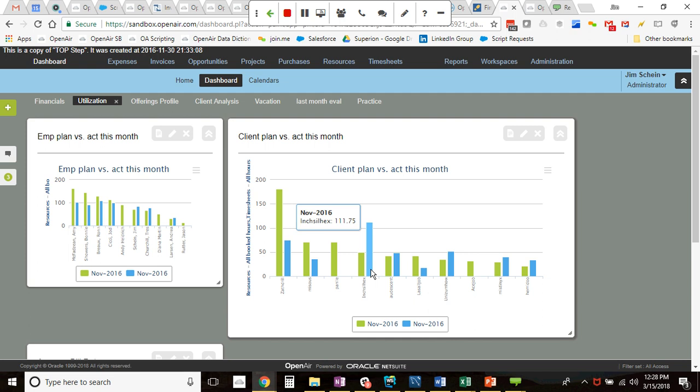I'm going to advise against it, and I'm going to advise against it rather strongly. The reason is that you then remove any ability to determine how you are doing against your forecasting. Because you've removed your booking numbers, you've removed your forecast essentially, and you can no longer see that we have this pattern of overbooking people, or this pattern of underbooking people.